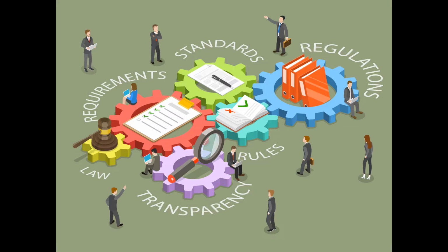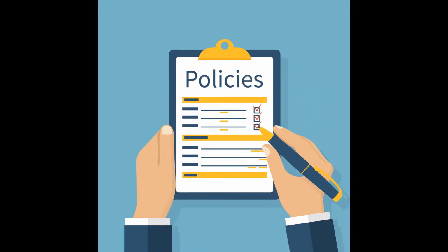The organizational process assets that can influence the monitor and control project work process include organizational standard policies, processes, and procedures. Financial controls procedures, for example required expenditure and disbursement reviews, accounting codes, and standard contract provisions. Monitoring and reporting methods. Issue management procedures defining issue controls, issue identification, and resolution and action item tracking. Defect management procedures defining defect controls, defect identification, and resolution and action item tracking, and organizational knowledge base, in particular process measurement and the lessons learned repository.